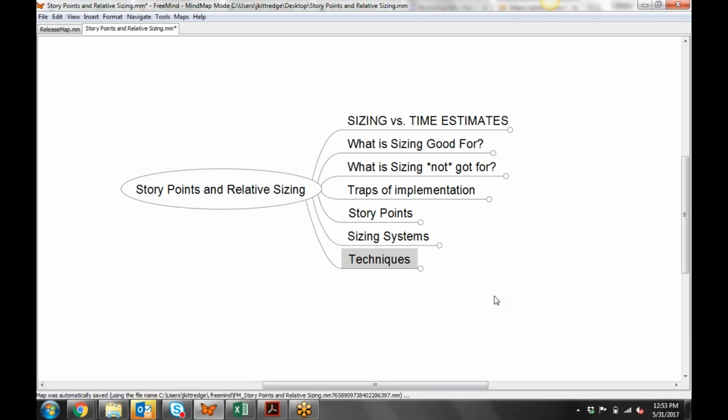On the other half, the engineers, the people who are actually doing the work, that includes QA, development, all of those, they basically need to say, okay, what's it going to take for us to deliver that? So if you take all of the value, which comes from the customer side, and divide it by all of the effort, which comes from the engineering side, that's how you arrive at your overall ROI. If a customer makes something very valuable, their ROI is going to tend to go up. If the engineers say, well, that's a lot of effort, it will tend to go down. And the balance of it is what you end up with in that ROI.